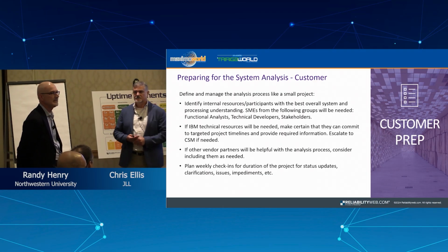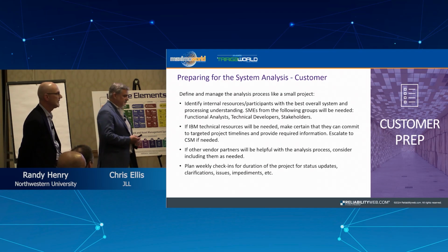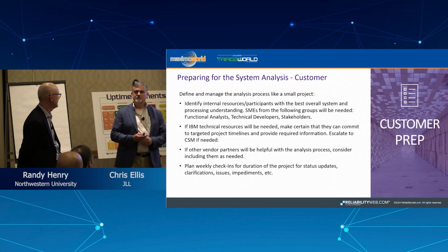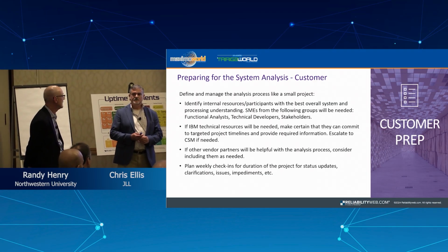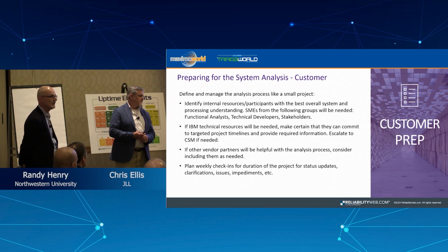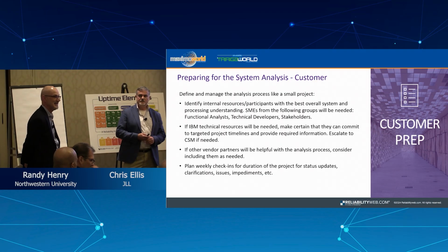I don't think we really needed to for this assessment because many of the things we already had a good handle on, but I would have called my partners if we had questions and we needed JLL to understand what was going on. And then this last bullet, really important, meet weekly. We did have updates every week, and even though Chris could have gone back and sat down with all the data, the pages and pages, we did have status updates. We did have questions. He probably had questions for us as well as we were going through the process. So really important steps. Run it like a small project.